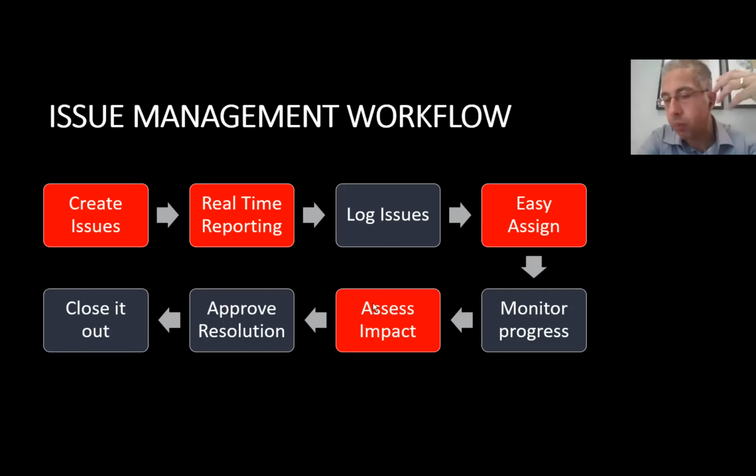Then you have to monitor the progress, how the solution is going on, whether it is working or not. Then you have to assess the impact and approve the resolution. There's somebody who approves this workflow, who understands best and tries to find the best solution with the proper resources, because you can't use a lot of resources on just one issue, and there should be a risk analysis about it. Then the issue is closed.